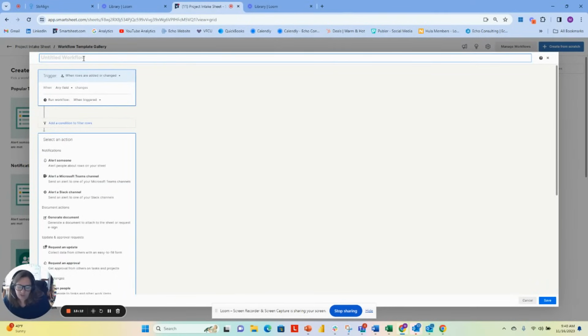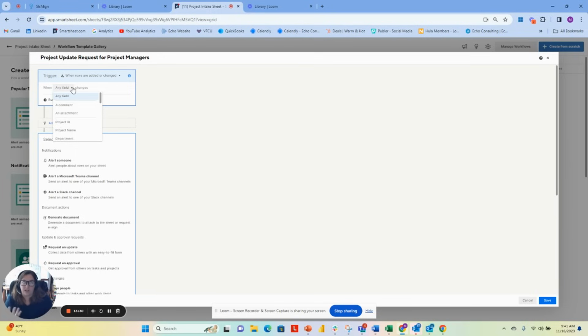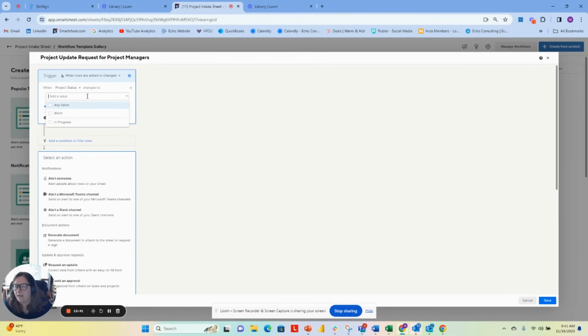And for this one, I'm going to do a project update. So I'm going to say a project update request for project managers, right? And so it's really important for me to make sure that I name it so that I know if I need to update it. So the first thing I'm going to be doing is saying, okay, if I want to get a project update, it means that I need the project to be in progress. So the first thing I'm going to do is I'm going to go look at project status and say I only want to request an update if it is in progress. Okay. Now, this is the trigger and this is the action and these are the conditions.